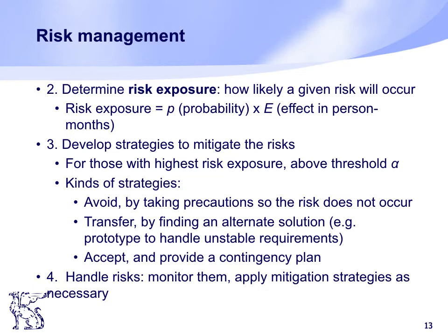So the two additional strategies are control, that means take action to minimize the impact or reduce the intensification of the risk. So that's one more strategy, control. And there is another one which is the simplest one: continue monitoring. Okay, so you have to continue monitoring. It's suitable for low impact risk, but for high impact risk it's not suitable. Okay, so you will just monitor the project environment for potentially increasing impact of the risk.